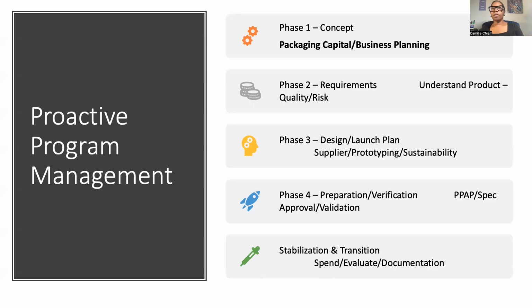For the unknown, you are looking at what the risks are, what the packaging needs to do to protect, display, dispense, and transport the part effectively, safely, and at a cost that's in line with the program. If you are doing this on a regular basis and you work a lot with your program management team, they will start to rely on you and lean on you for that information, versus coming up with a percentage number and using that across the board. It'll be a much more accurate piece of information.